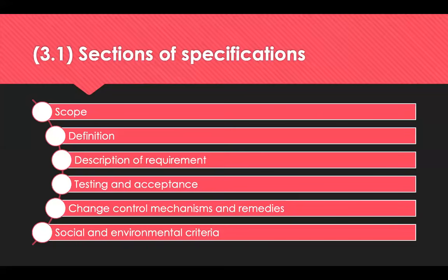The description is determined by the type of specification. We know that a conformance spec will be precisely setting out the instructions to which a supplier must conform. But an output spec will consist of a description or clear functions that the performance is required. It will have a broad description of the end result and a vision for delivery, focusing on the need of the user to prevent the list getting too long and unmanageable.